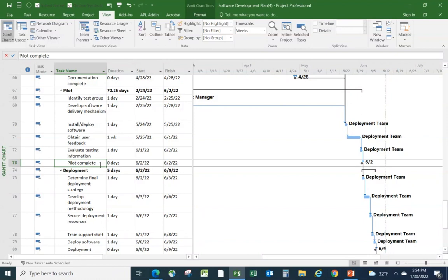It's not a universal golden rule, but it is a good practice. On the other hand, milestones can be more abbreviated. They can be more referring to the fact that something is complete, major points in the life of the project, and what we use milestones for. Typically, we're not assigning a milestone to someone to do, but these tasks we're assigning resources to do work, and that's why we use that formulation.